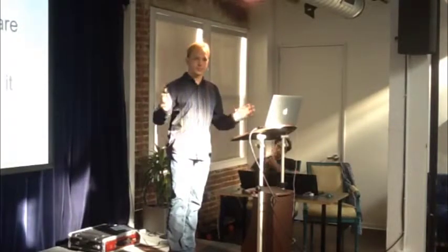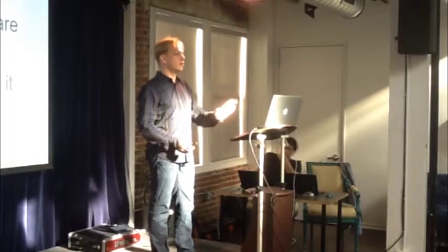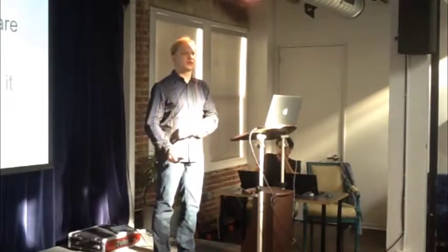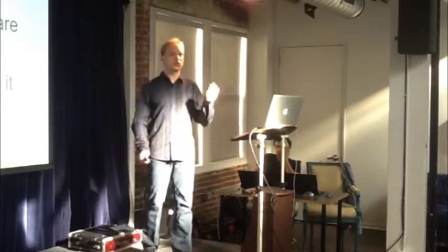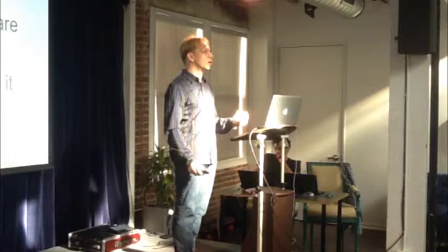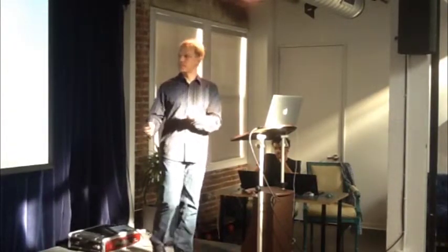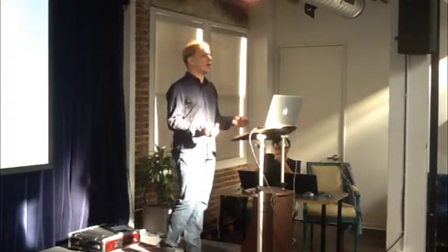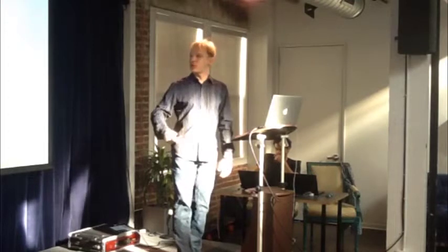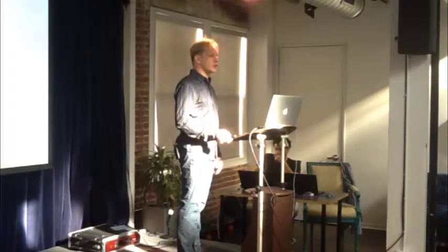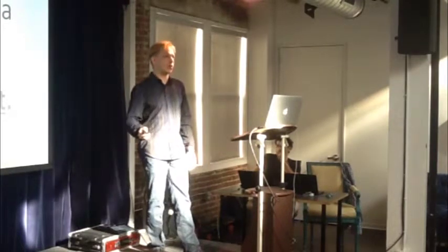So, just going to put it simply, the only time a software product is done is when your company has failed. When you enter a software startup, expect to continue to spend money on the software indefinitely as long as you are succeeding. Any estimate that you get then is not a total, because there is no total. Development is ongoing. An estimate is for a milestone. So don't mistake a milestone for an endpoint.